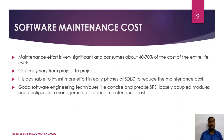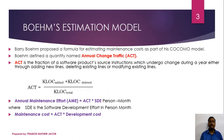Implementing changes in the later phases of SDLC is a time-consuming as well as an economical process. Good software engineering techniques like concise and precise SRS, loosely coupled modules, or proper configuration management policies can reduce maintenance cost. In order to estimate the software maintenance cost, there are two cost estimation models: Boehm's estimation model and Belady and Lehman estimation model.